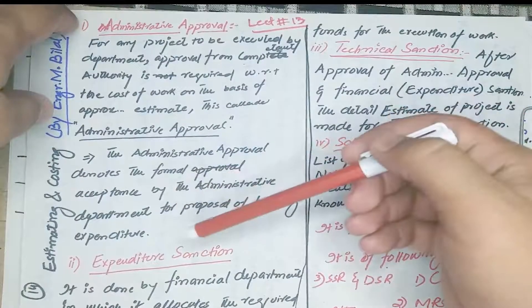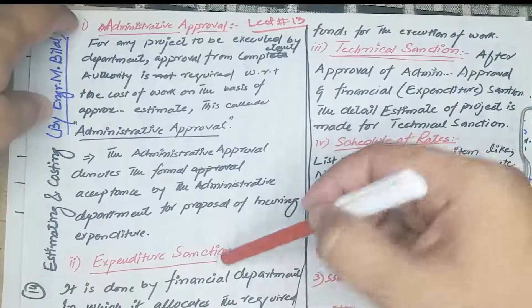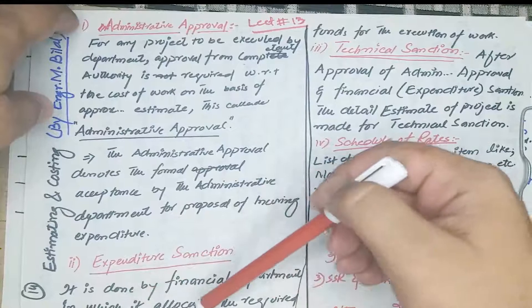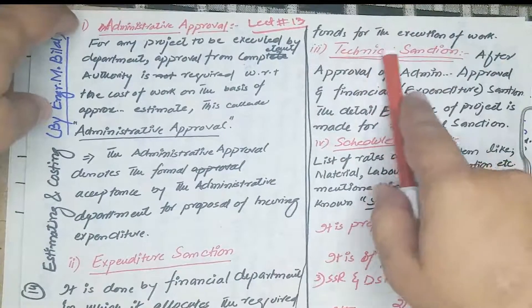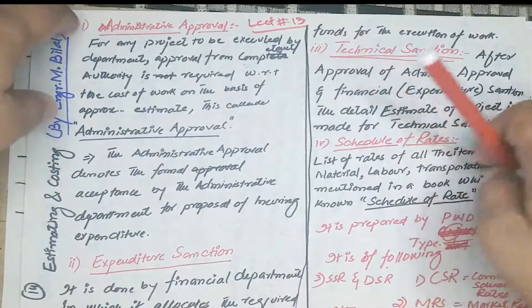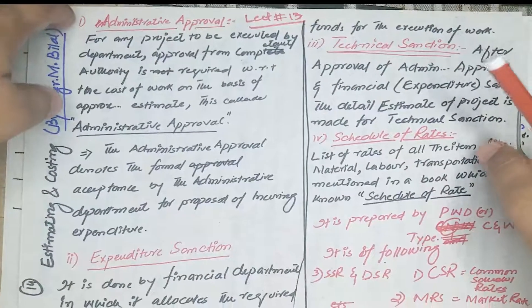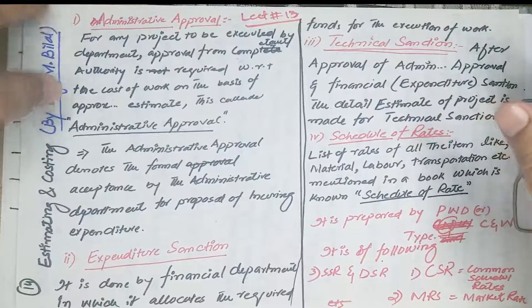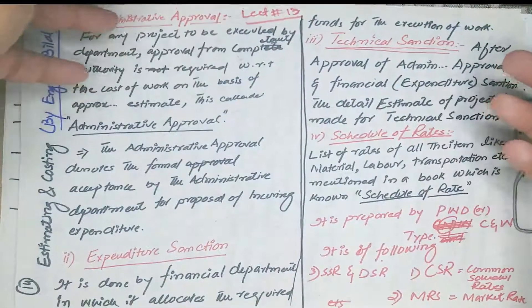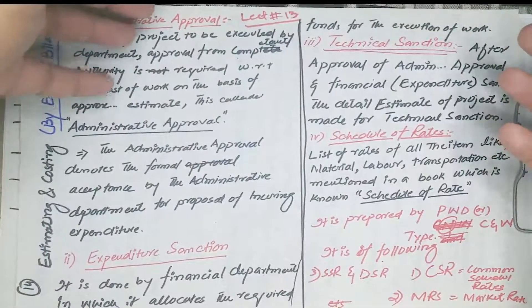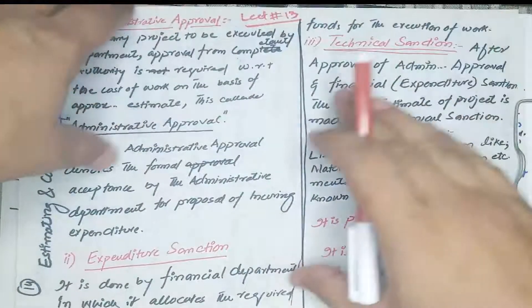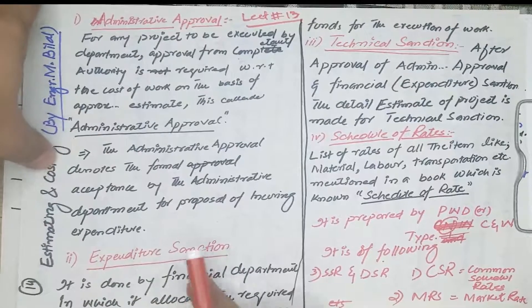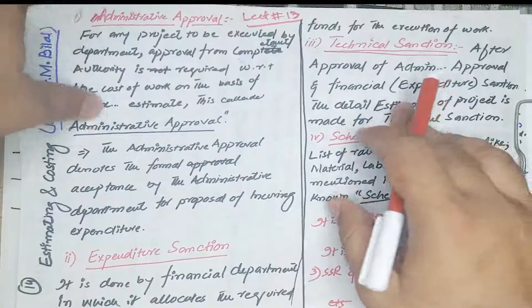What is expenditure sanction? It is done by the Finance Department, in which it allocates the required fund for the execution of the work. For example, if we approve the project but have no fund, we cannot execute or complete the project. Therefore, after Administrative Approval, we must obtain expenditure sanction from the concerned Finance Department.